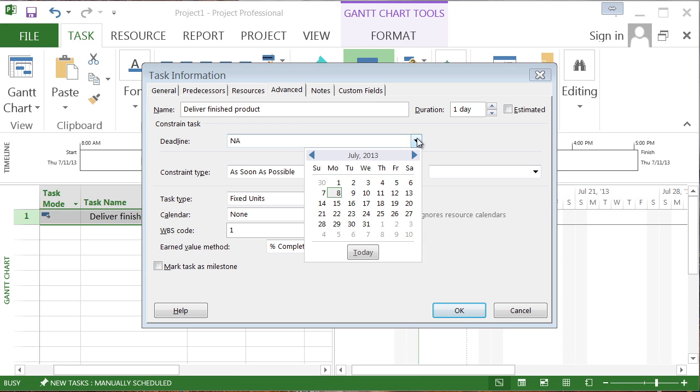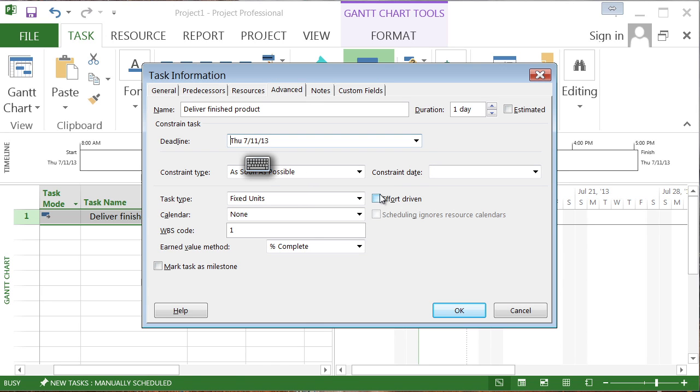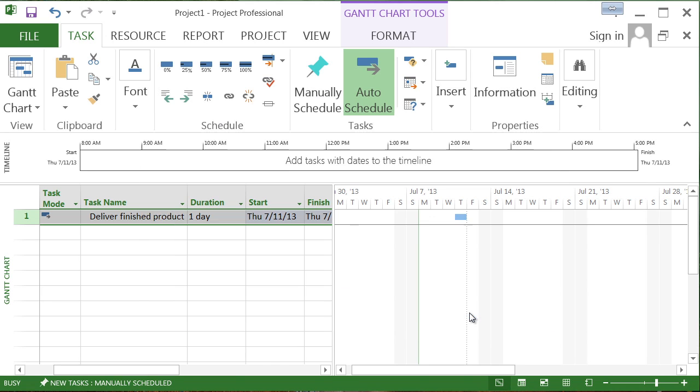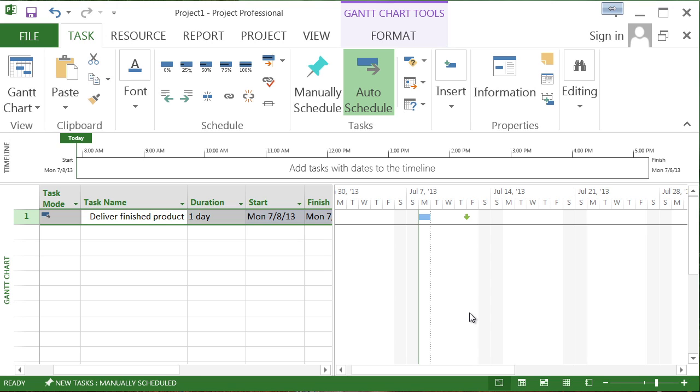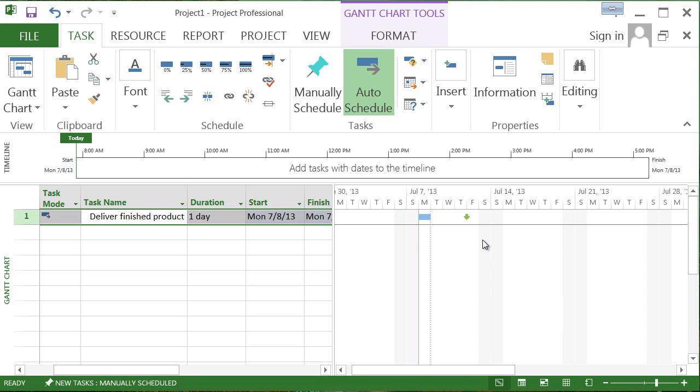As far as a deadline goes, yeah, there is a particular deadline that we have in mind with this particular task. Notice what's happening now? Microsoft Project gets it back to an as soon as possible default flexible constraint type and notice it drops in a deadline. Yeah, we can see the green arrow indicating the deadline for this particular task.